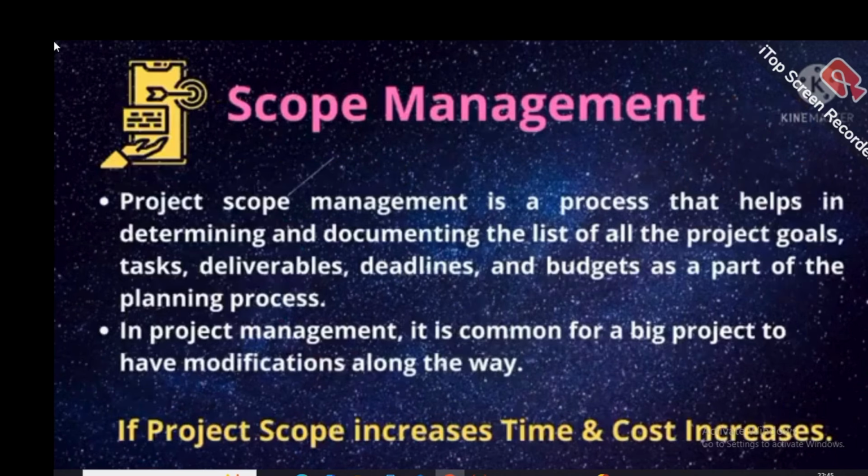My dear friend, scope management is very, very important. If scope increases, your time and cost will increase. Project scope management is a process that helps in determining and documenting the list of all the project goals, tasks, deliverables, deadlines and budget as a part of the planning process. In project management, it is common for a big project to have modifications along the way. If the project demands it to get the end results, modification takes place, and scope also varies. If project scope increases, time and cost increase, my dear friend.